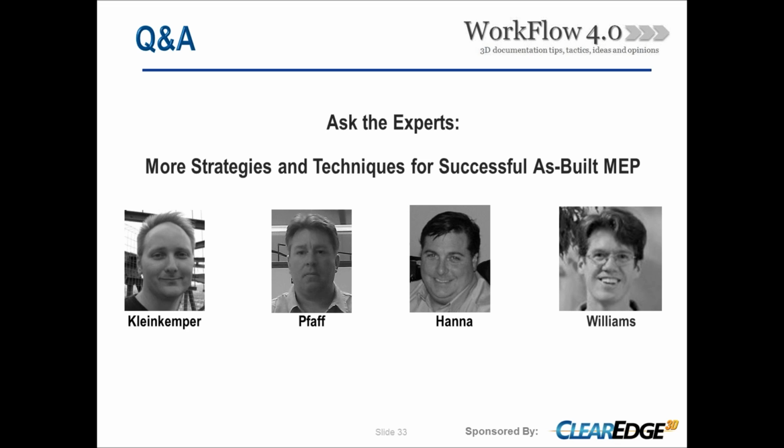But we figure 10 to 15 minutes per setup. Is that what you guys are thinking when you do your estimates? We count 20. Hopefully we go faster than that, but just to not stress the tech out with the instrument, we try to give them 20 minutes per setup.